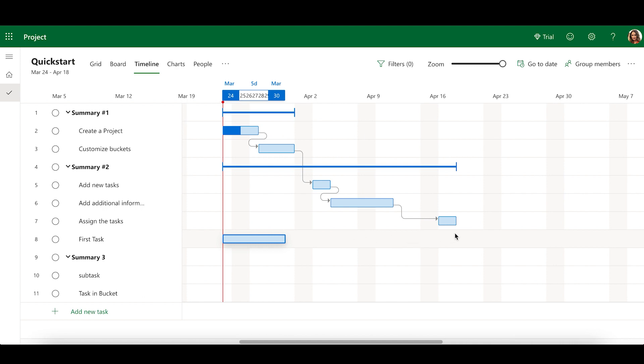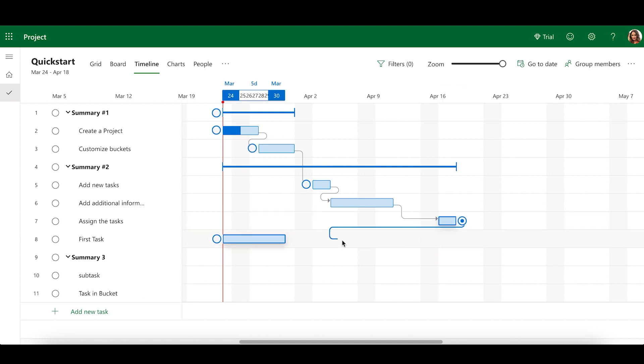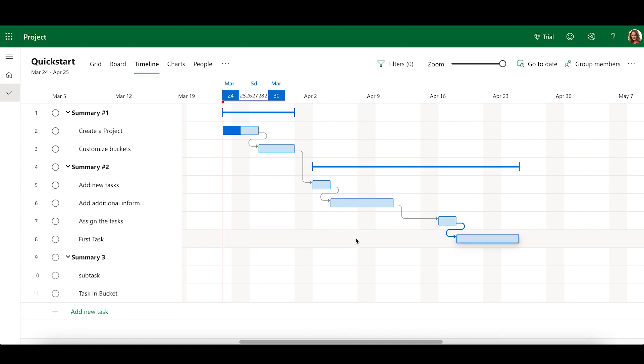To add a dependency between tasks, click on the right dot on the task that must be completed first, and drag and drop on the dependent task.